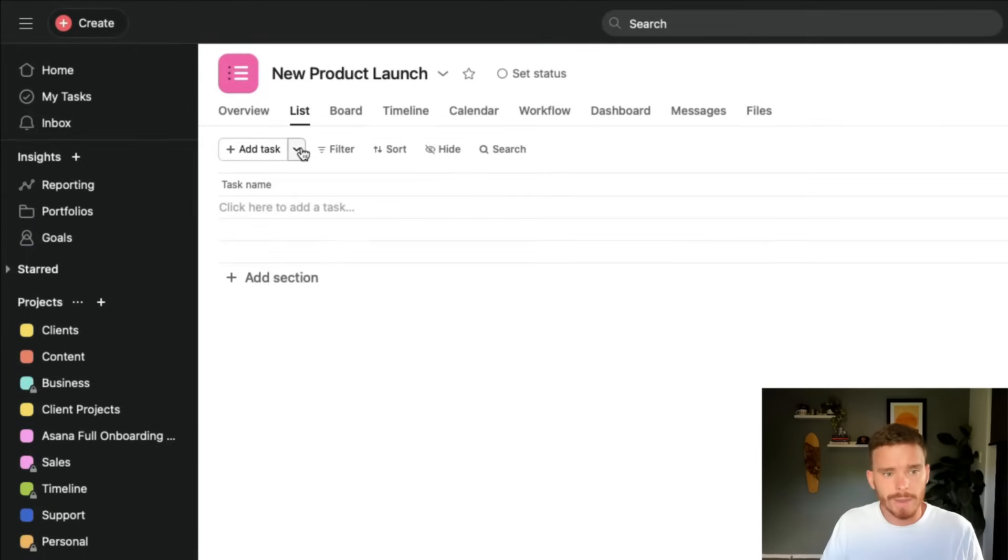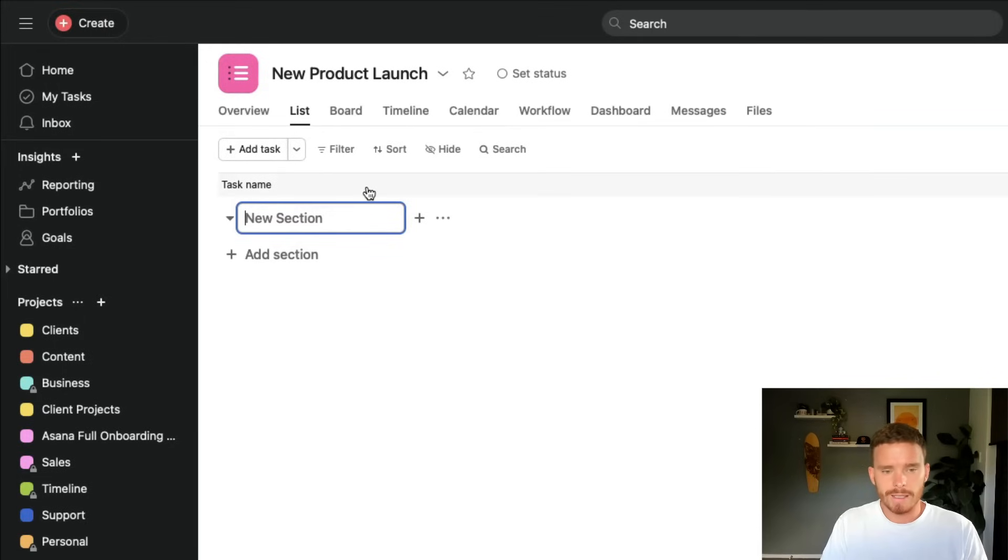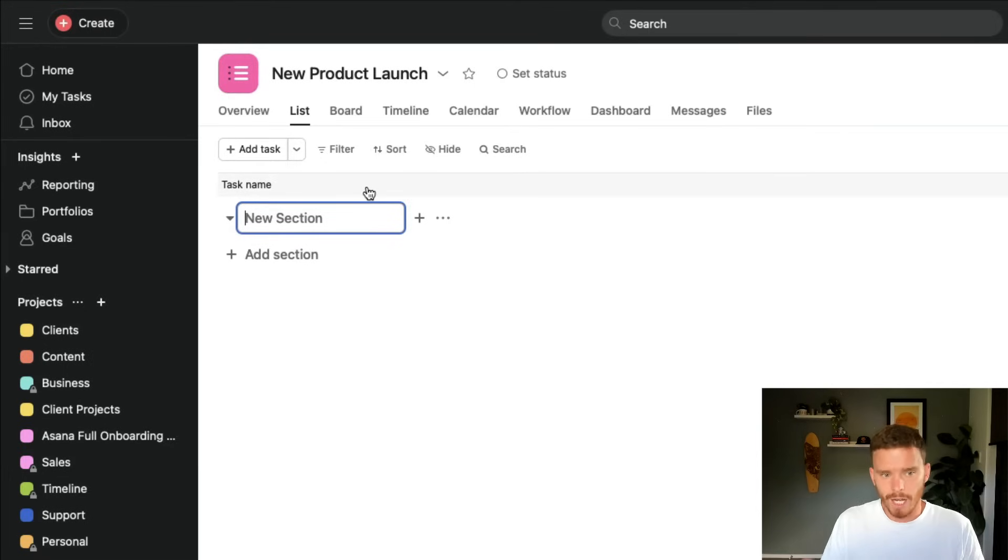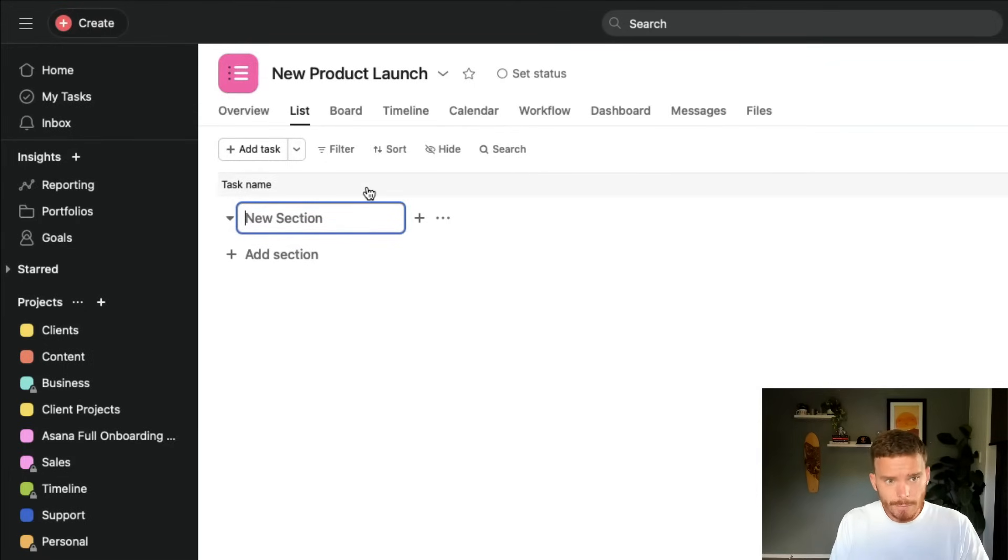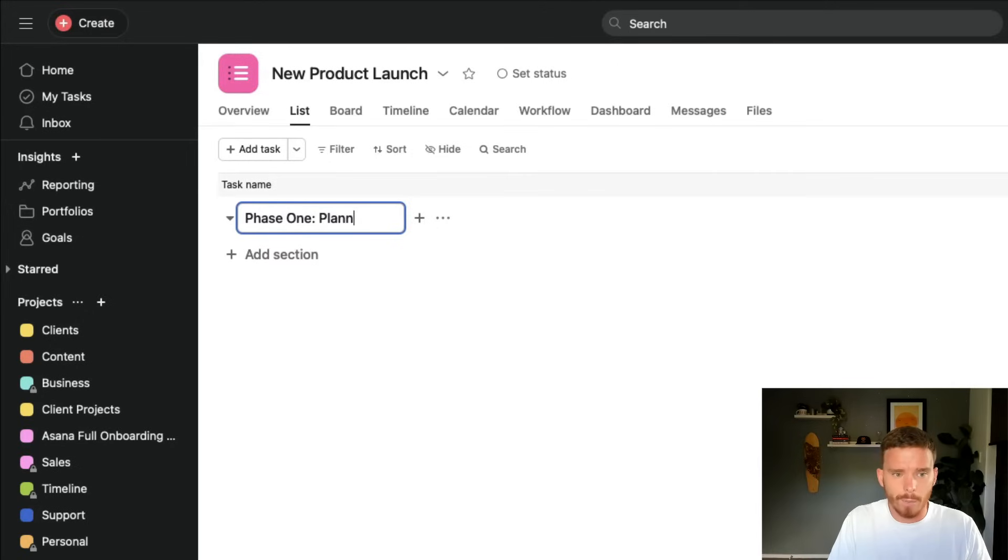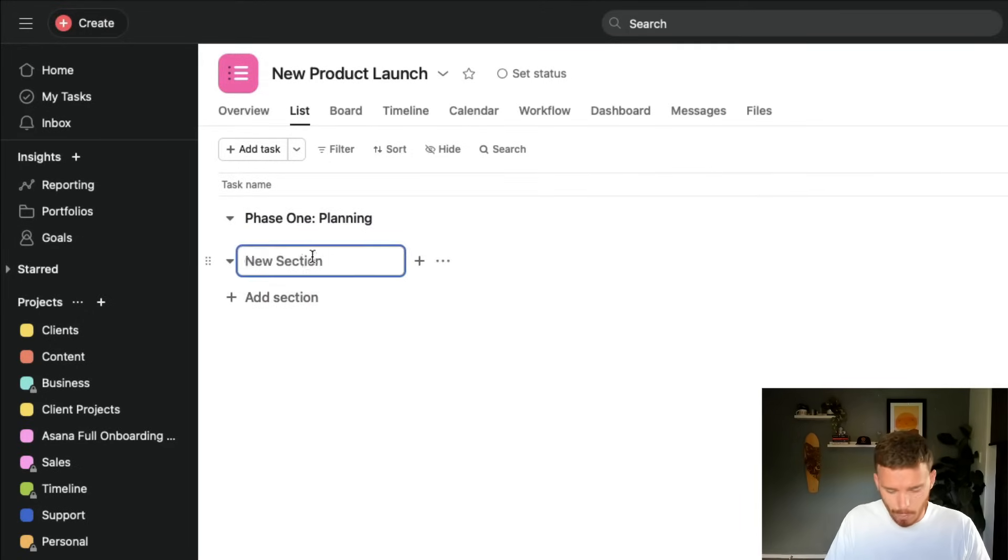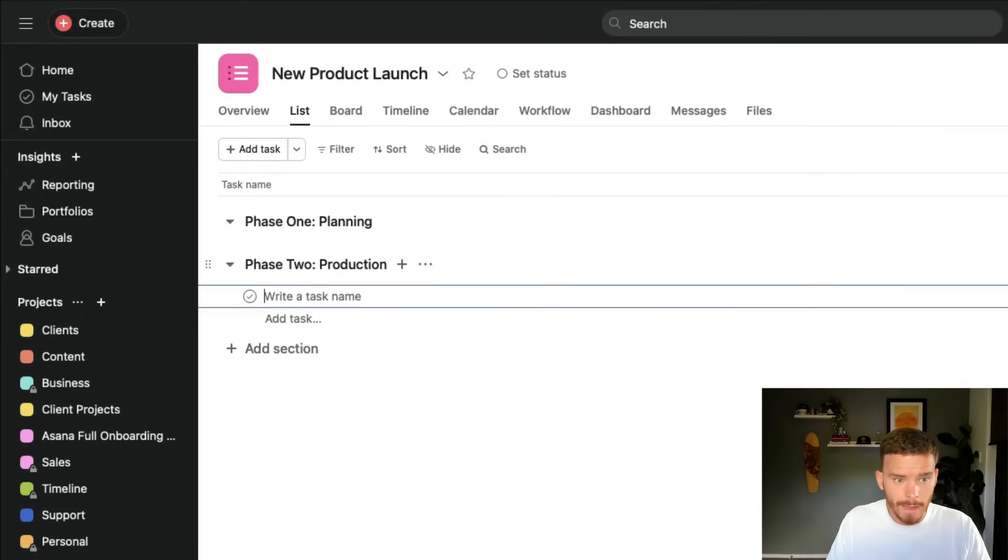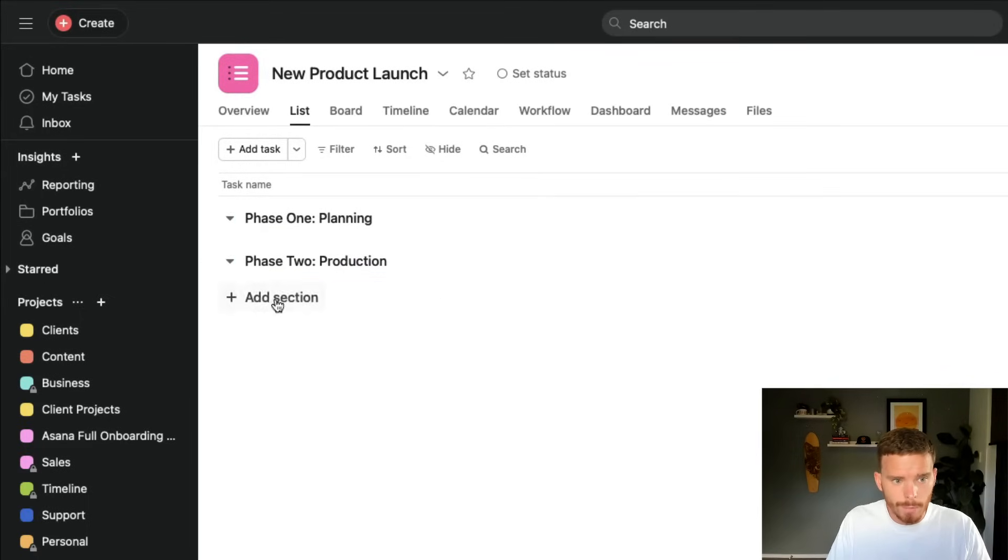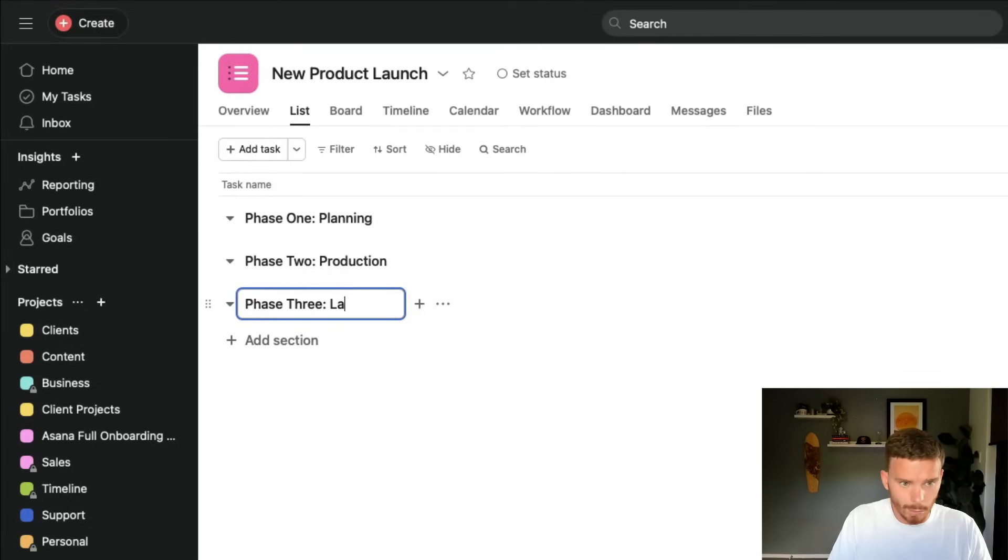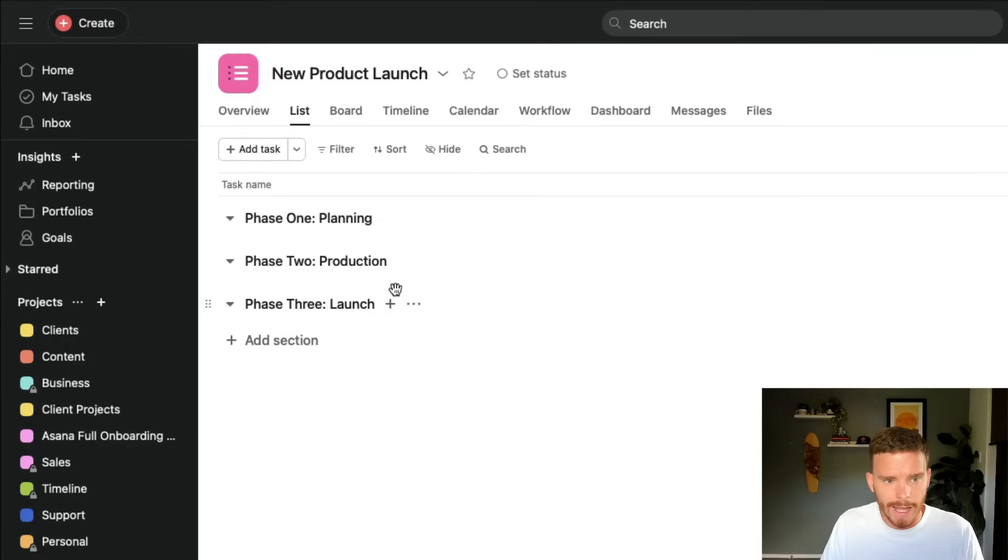Once I'm happy with the details on the overview page, I'm going to go back to my list view. And the first thing I recommend doing is creating some sections, which we will use to organize the tasks into different stages or phases. And how you use sections will vary depending on the type of project that you are creating. So for something like this new product launch, I might have sections for phases where I say phase one is about planning, phase two production, and then phase three launch. So sections are just used to organize the tasks into different areas.